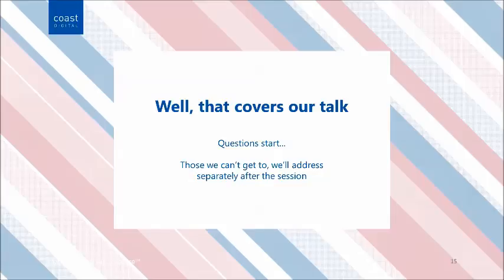In terms of that one about the highest paid persons, do you remove them from the process? Yeah, that's exactly right. There have been times where we've pulled someone who's particularly loud out of a workshop and taken them out of the room to say that their input's appreciated, but they're now dominating the conversation. The other thing is we'd always encourage a steering group to be built of people of a similar level of seniority, so that they can all speak on a level with each other, and no one's dominating that steering group too much. Those are two things we try to aim for.